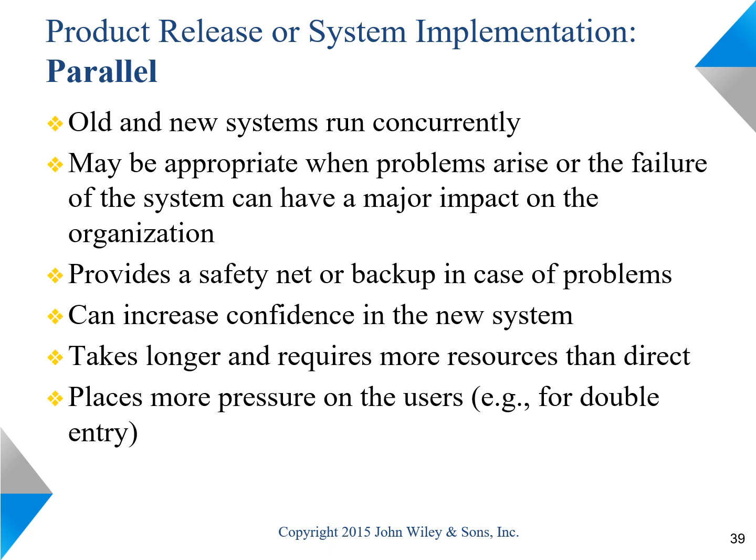One of the advantages of the parallel implementation approach is that it reduces the risk, because if there are some problems found in the new system, you can stop other parts of the organization from moving to the new system and try to resolve the issue at a much smaller scale and minimize the impact to the overall organization.